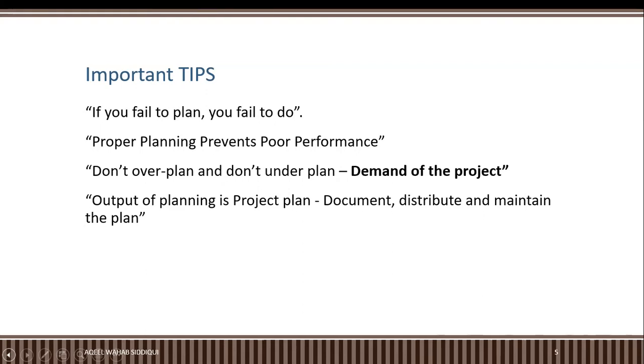Next step is we take our requirement documentation and summarize our work in the project scope statement. The project scope statement contains what is excluded from the project, because later on in the executing process group many team members and project stakeholders will approach you to make changes in it.